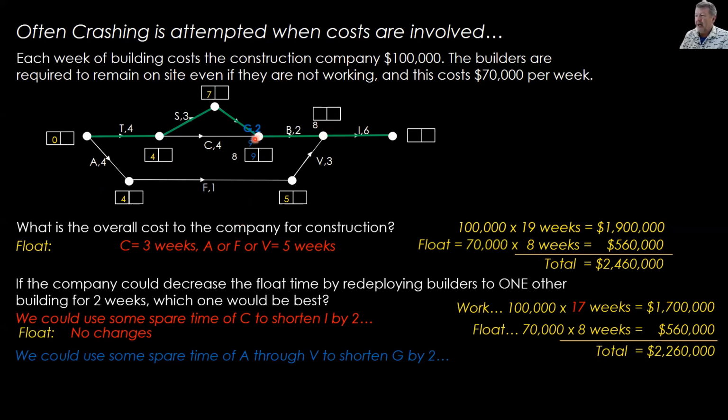All right, where we get up to 9. 9 plus 2 is 11. So 11 and 8, 11 obviously goes in there. We're at the junction, so we have to come back down here. 4, we've done that. Plus 1 is 5, plus 3 is 8, so that's still okay. 11 or 8, that's good. 11 plus 6 is 17.